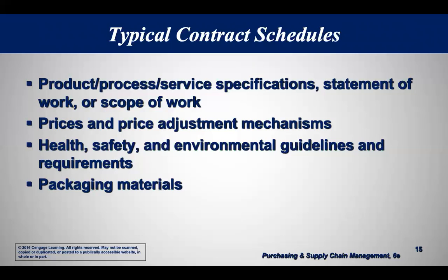By this we mean the schedules at the back. Schedules or attachments, okay? And this is the technical information. It's not the contract terms per se, but it's just all the technical stuff. And some people think it's the most important, but this is where we actually put the specifications for what it is, whether it's a product or a process or a service, the actual specifications, what the statement of work is.